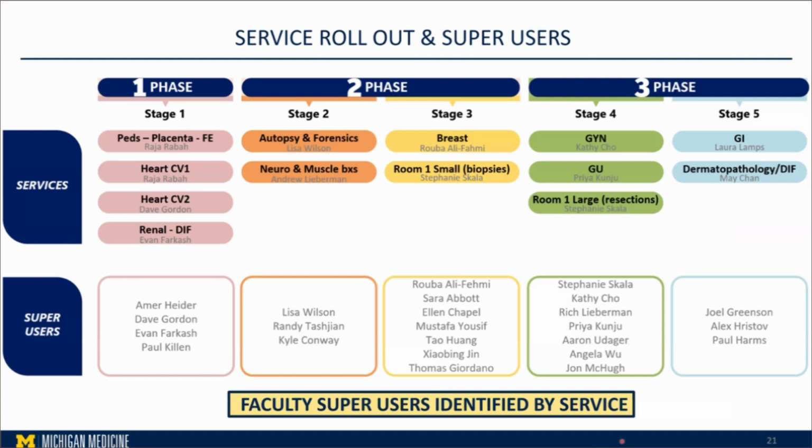We show a plan that we're not going to go fully digital with every single service. We plan to start with the services whose faculty are really enthusiastic to go fully digital, or services that work in multiple hospitals, where digitization will help them a lot by decreasing the turnaround time. Maybe the small services that we can focus on to have a successful transition, and after that we'll focus on the cases that are more complex and have more faculty involved, and show it to the department.